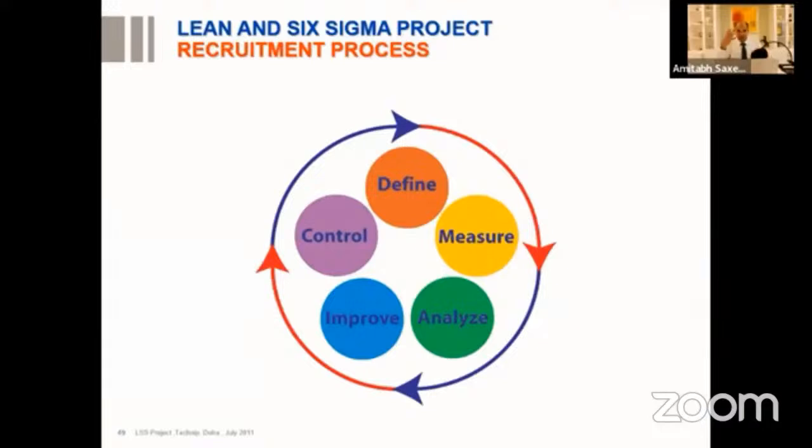A team undergoes 4 stages, or for that matter, 5 stages: forming, storming, norming, performing, and adjourning. Forming means you form the team: Mr. A, B, C, D, you are in one team. The next stage is storming. People will not start working on the project of reducing the recruitment cycle time. They will start questioning why Mr. B is on the team, why C is made the project leader, I am a better person, why am I not the leader. Usually storming happens.